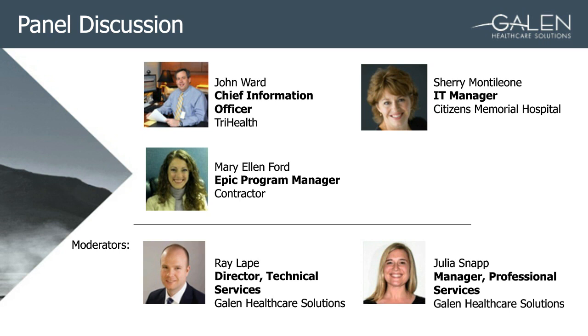First of all, you just need to know where your expertise comes from in pulling the data from that source system. What we found was our resources were scooped up pretty quick because of the Epic project. So a lot of our IT knowledge moved over to the Epic project team, and they weren't going to work on anything else except for Epic.